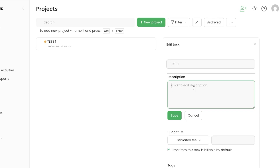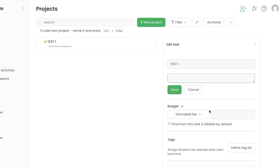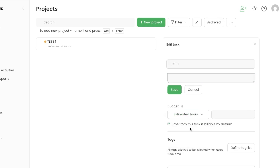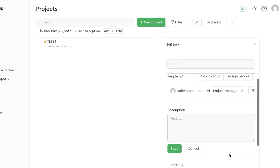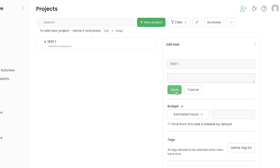I'll add a description for now. Scroll down to Budget — this is important. You can choose estimated hours or estimated fee. Since this is an hourly project we'll track time for it. You can also define a tag list and add different tags, then click Save.